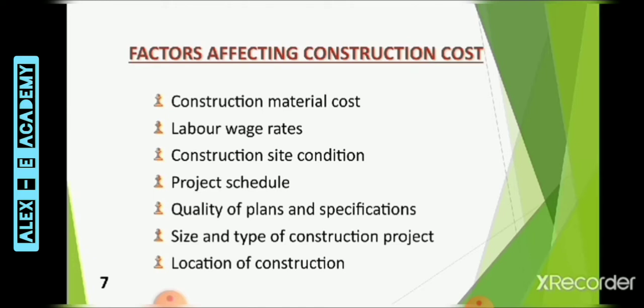Next is construction site condition. Site conditions such as poor soil condition, wet land, environmentally sensitive areas, river or stream crossing, and heavy traffic can increase the project cost.